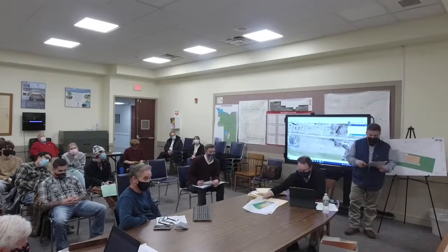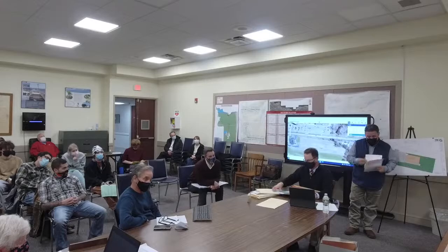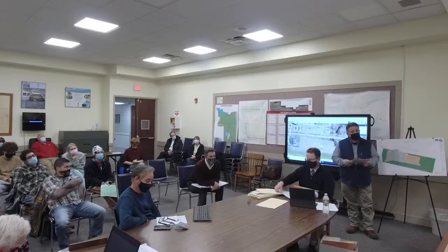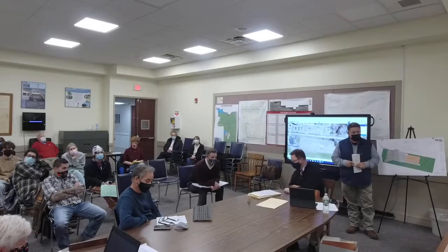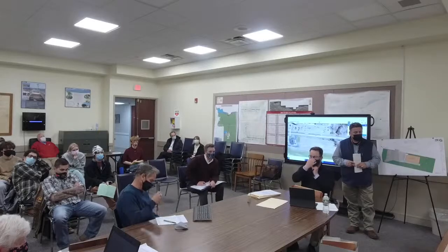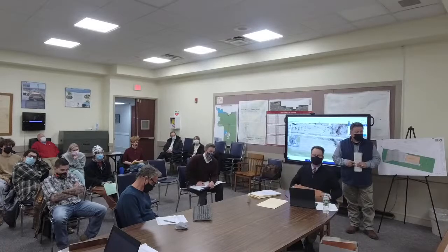This is standard procedure on our part. This is what we normally do. Right. Just so you understand, B&L contracts with us, with the town. So you submit to them, they look over what we've got and what they need to evaluate, and they write a little proposal as to what that would be. That money needs to be put into escrow with the town, and then they proceed and give us the report. And again, the more back and forth there is, obviously the cost goes up.